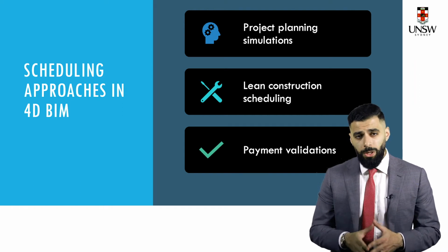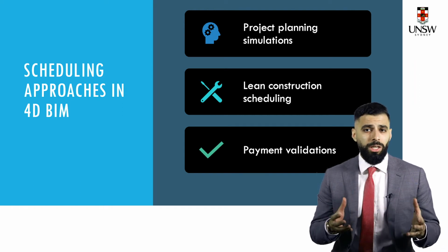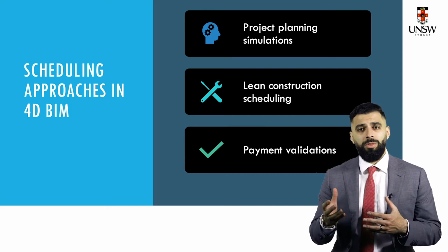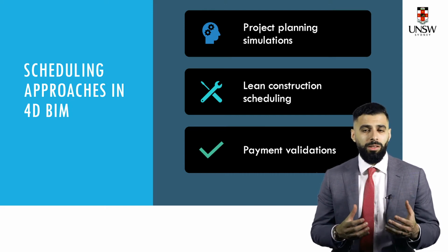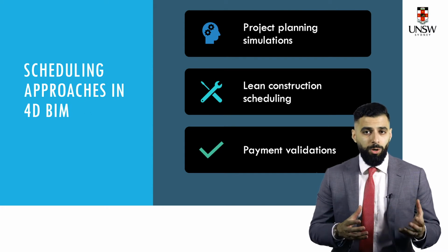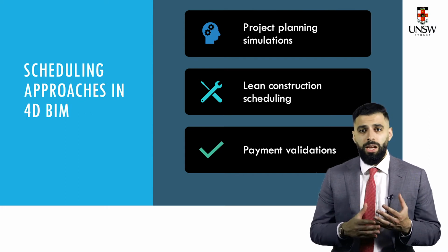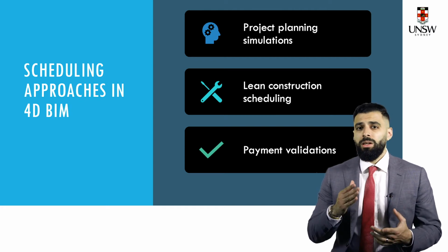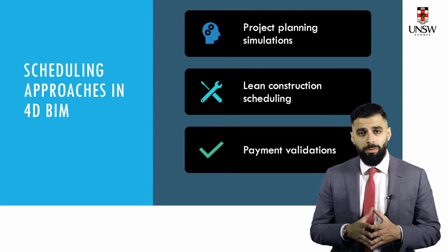4D BIM. First, we have project planning simulations, which involves simulating some of the conditions that are expected to impact the planning for a construction project, including site planning, transportation and site access, safety, and construction sequencing.